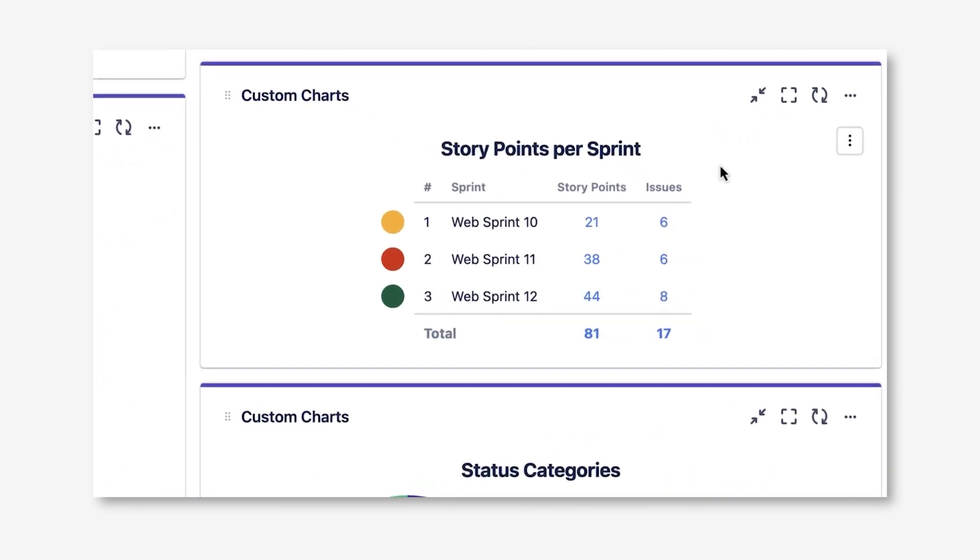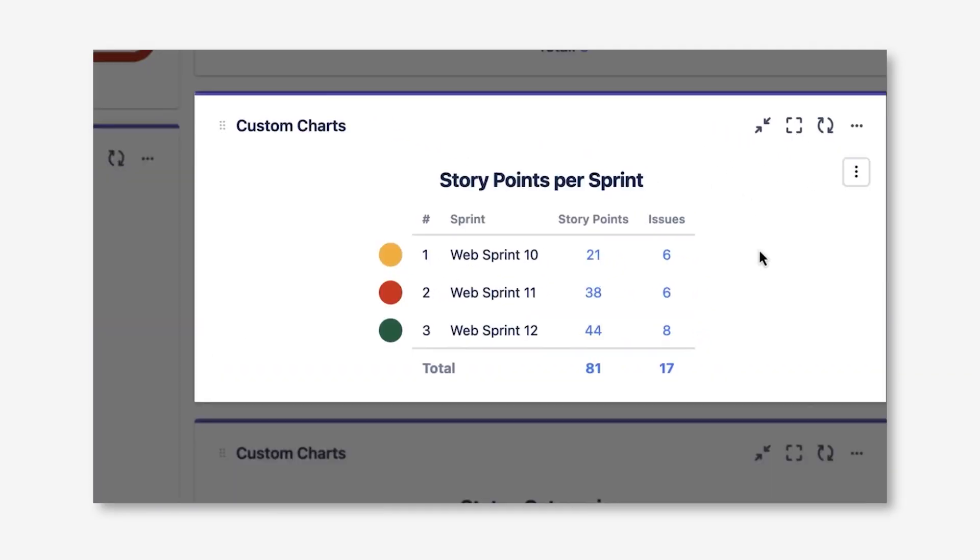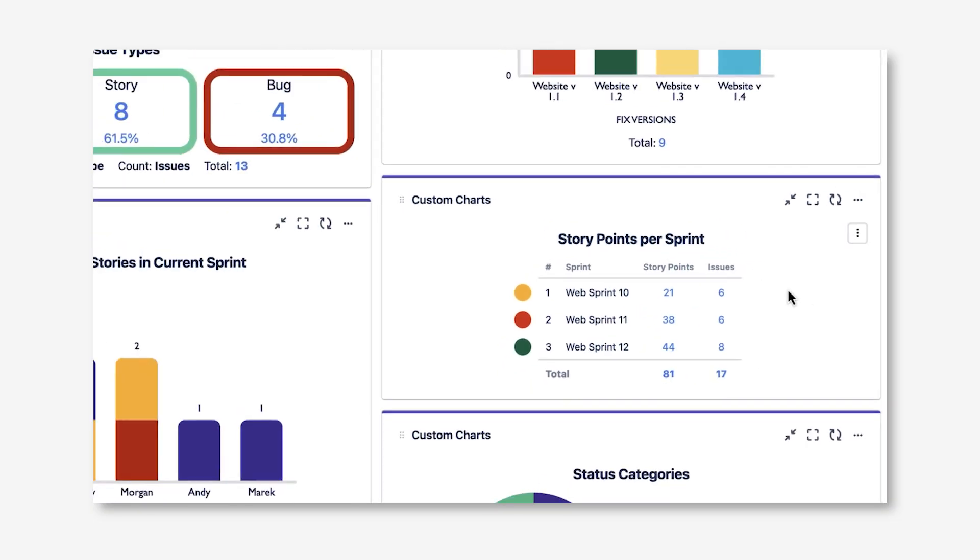On this Story Points Per Sprint report, I have a 2D table chart that's actually showing me the team's velocity. One really neat thing about Custom Charts is you can calculate the average or sum of any number field in the instance or date field, even if it's a custom field. That allows us to help our teams understand how many story points they're completing in each sprint.